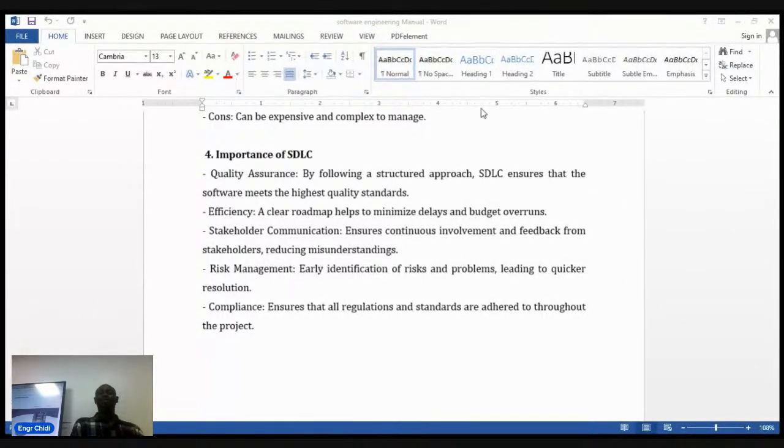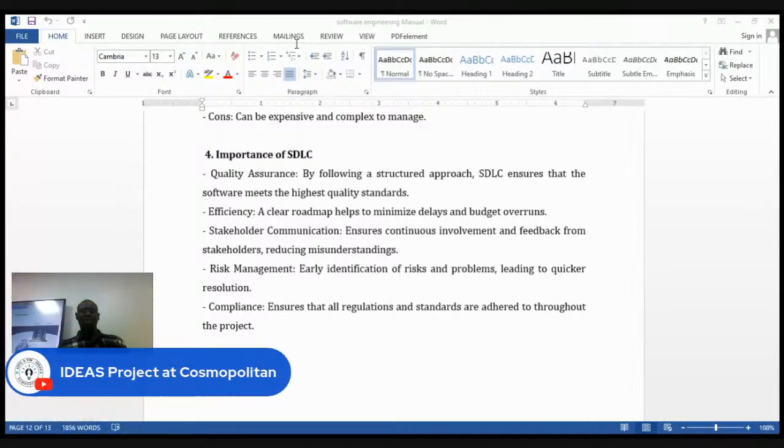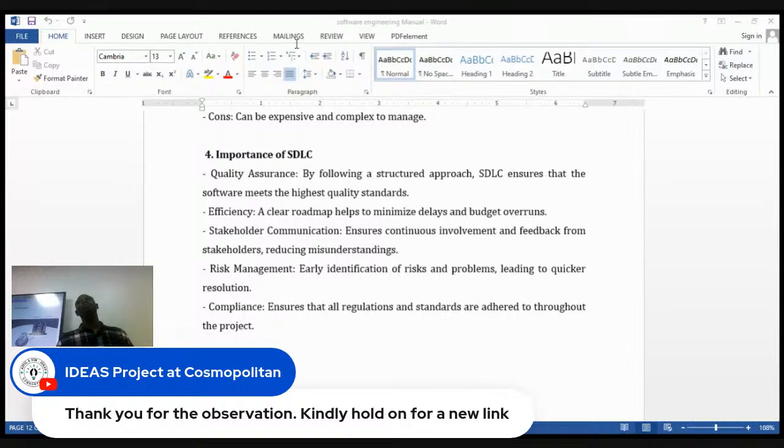How much you will charge them depends on how many days this work will take, because we usually charge per hour, but you can charge per day if you want to. If this work is going to take 3 months, how much are we supposed to charge for a day? Maybe 10,000 a day.